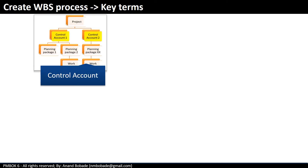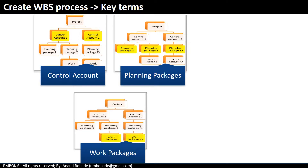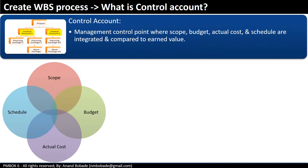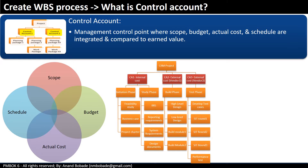Let's take a look at some key terms used in the Create WBS process: control account, planning package, and work package. Control account is a management control point where scope, budget, actual cost and schedule are integrated and compared to earned value. For example, in a CRM project, management might mandate monitoring the cost of internal resources and various vendors separately through respective control accounts. There are three control accounts: control account 1 for internal resources, control account 2 for vendor 1, and control account 3 for vendor 2. These can be analyzed separately in terms of planned scope, schedule, approved budget, actual cost, and earned value.